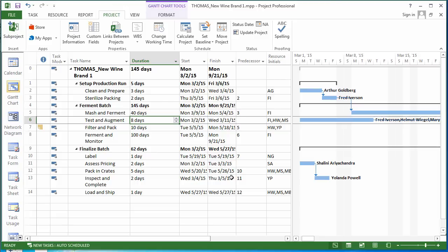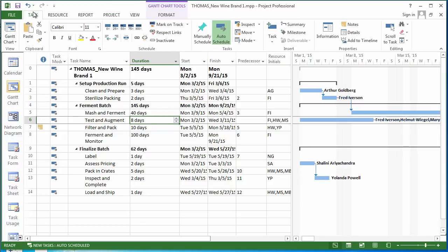You should get used to setting a baseline. When you get your basic details of a project together, go ahead and set a baseline. It allows you to roll back a project to a point in time if need be. It also allows you to compare progress from a given moment in time.